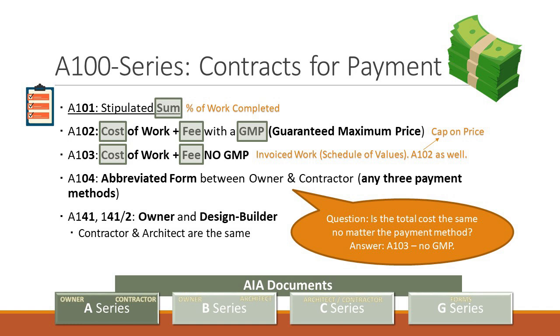Sometimes you'll see, especially early on in the project, an invoice that'll have under line item, structural steel, and it'll say 80%, and you walk out on the project site and there's absolutely no structural steel done whatsoever. That may be an issue where the contractor had to do a long lead purchase because it takes so long to fabricate the steel. So the work may not be completed, but they may have to charge you for the pricing. But again, it'll be based on a percent complete of the overall contract price.